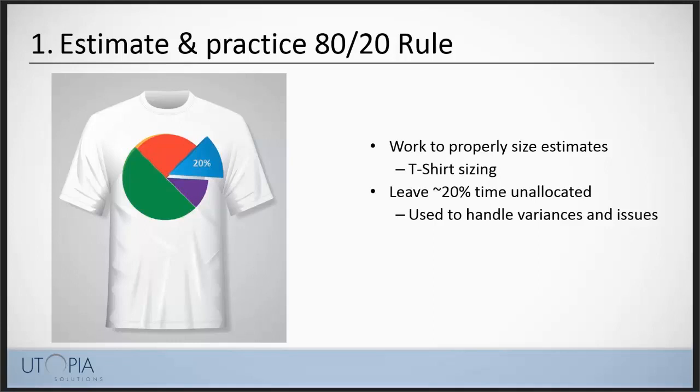In order to really get this right, you have to think about this in terms of the t-shirt sizing method. What does it feel like to build an automation deliverable? Is it a small, a medium, a large, an extra large even? And it's important to have your automation development team provide their estimates, but also the QA stakeholders and the owners of the test functionality. The reason for this is you might find quite different estimates from the different team members. It's important to know why those differences exist.